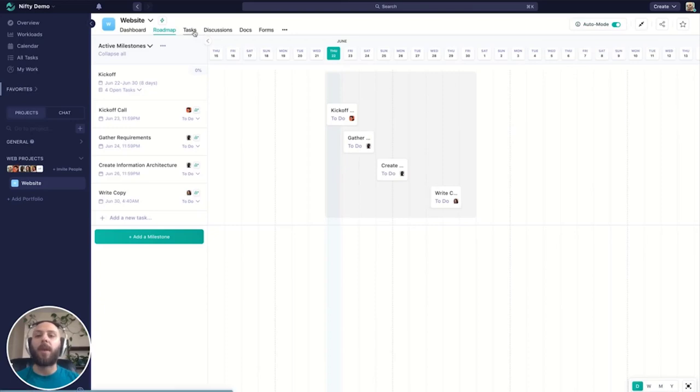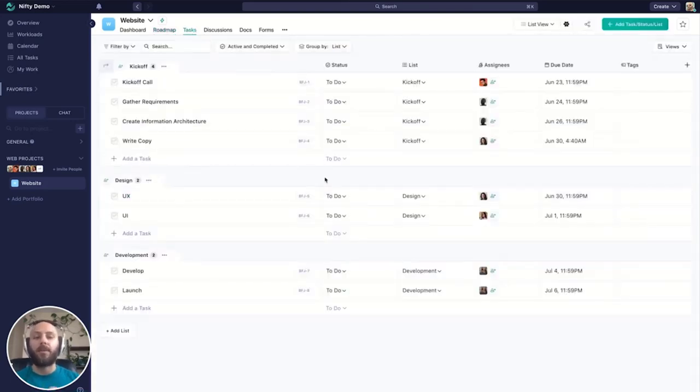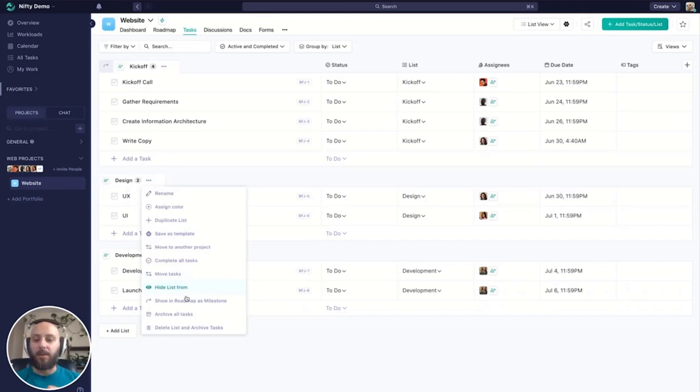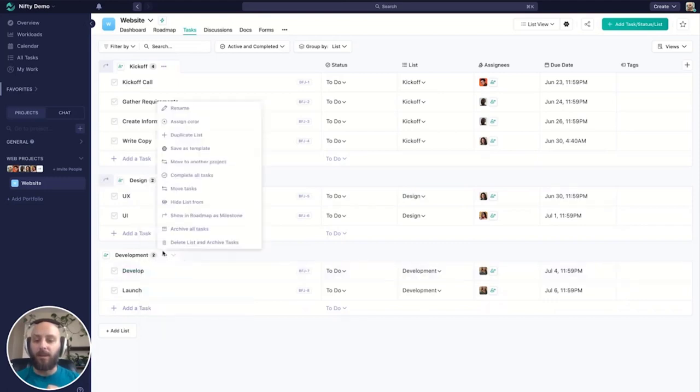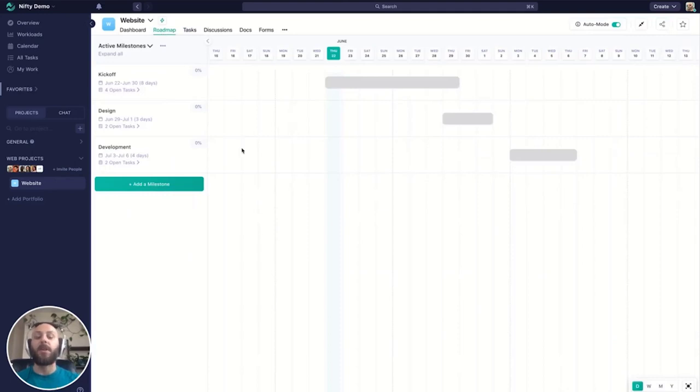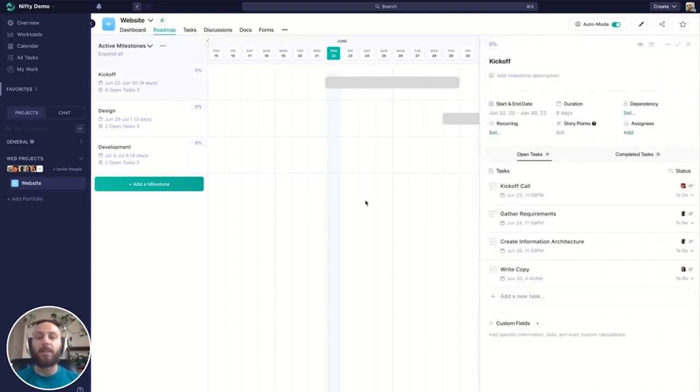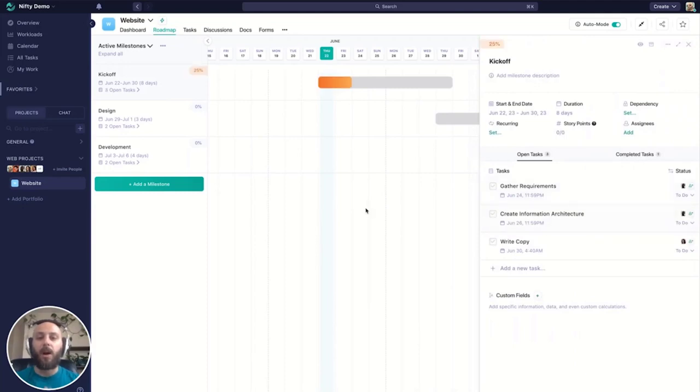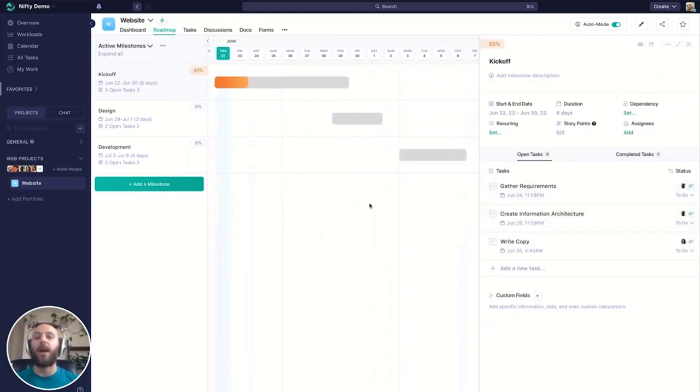So all I need to do is manage my task deadlines and my milestone deadlines will follow. And I can do the same thing with UX and UI, and development, design and development. So now we can see all these are on my roadmap, charted and easy to track. And so the big picture here, why are we putting these on the roadmap? Well, we'll see when I start to complete these tasks, we're automating progress of our project's roadmap. So now we're seeing the big picture, right? This is great for projects that have a start and end point, or if you want to chart the process, the journey of any process you're working on.